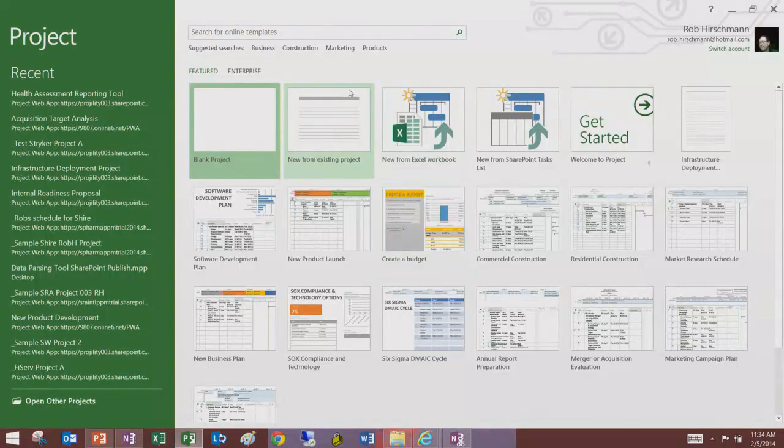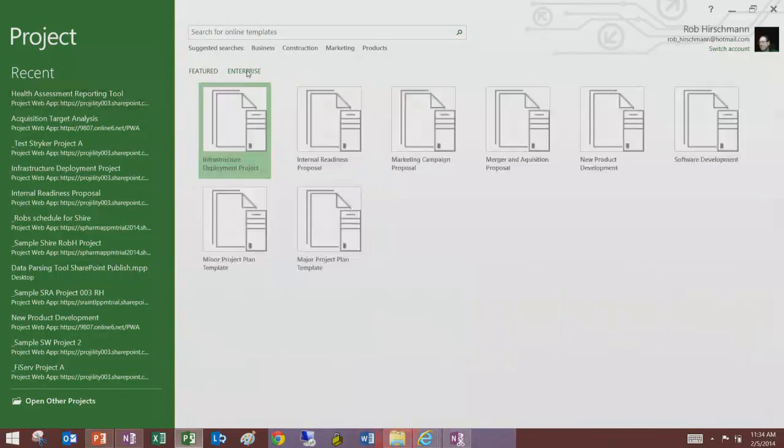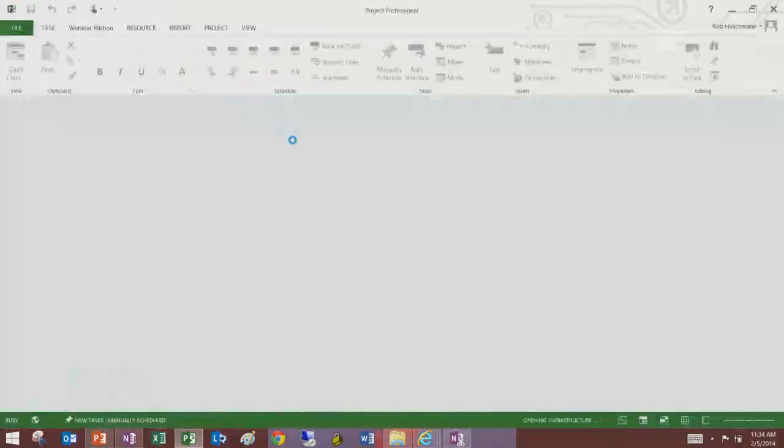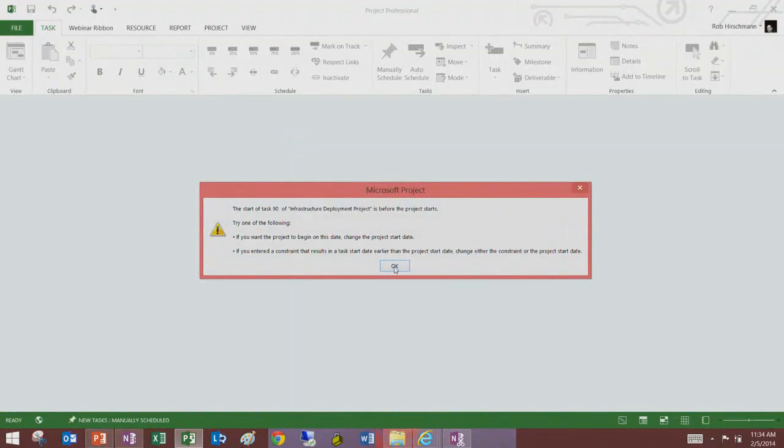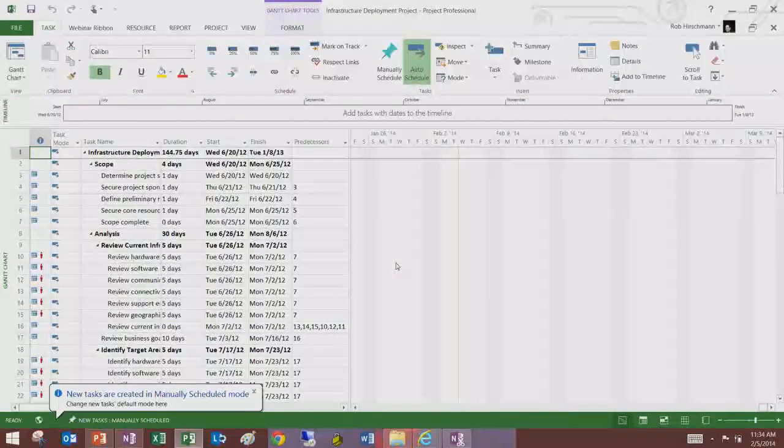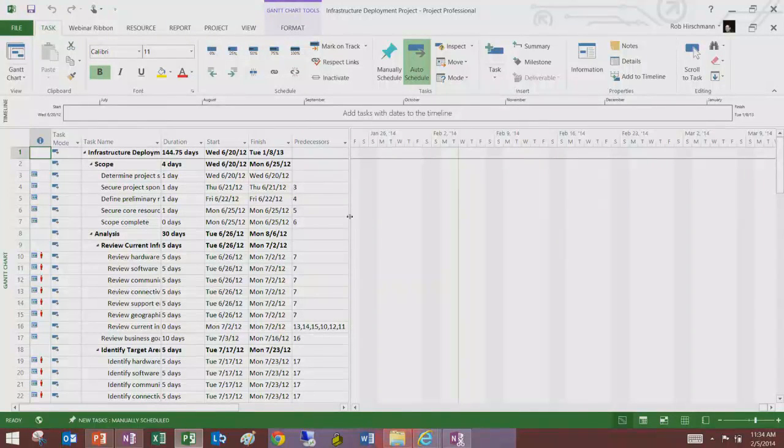So as you know, when you create a new project request, attached to that request can be a project schedule template. Based on that, we could have gone in and initiated a project off of a template, and it's all based off of our generic resource assignments. So this is where you make the transition from the resource plan. And there's an option to flip a resource plan into a build team from enterprise as well. A lot of our clients do that, and then they do the top planning.